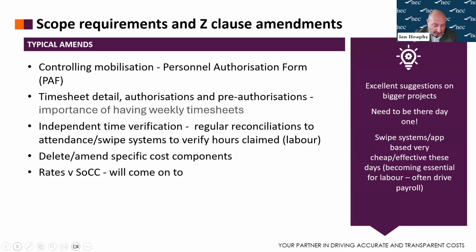You know, there's an environmental issue if you're doing hard copies, etc. So you do have to be very pragmatic around this. The key thing the contract requires is making the information available for inspection, not providing it. Yes, absolutely, that's absolutely right. And again, I mentioned earlier, you've got to be fit for purpose. I often see a sledgehammer to crack a nut, whereby we're requesting record after record, rule after rule, we're looking to amend or change for what is in effect a fairly low value or low risk contract.